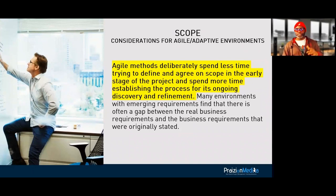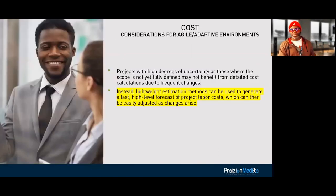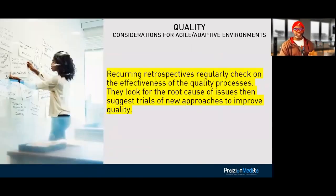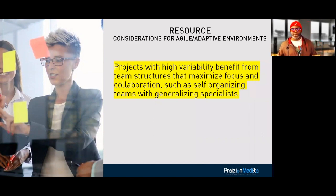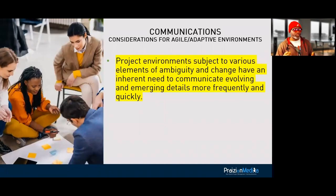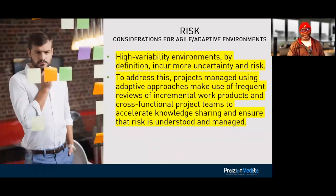We do lightweight scheduling and lightweight costing. Quality is about having regular retrospectives and regular checks on effectiveness. Resource management: we don't call people resources in the world of Agile — that's a big no-no. A project with high variability benefits from team structures with collaboration, flexibility, and T-shaped skills. Communications: we use information radiators and osmotic communication. Risk is not negated in Agile — a lot of teams use risk registers. There's a difference between a risk and an impediment: a risk is an impediment waiting to happen.